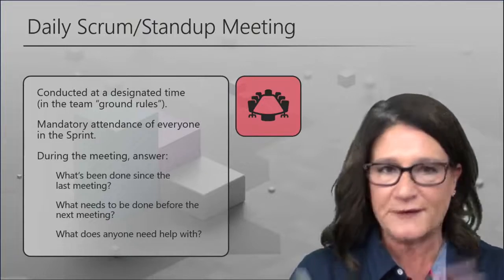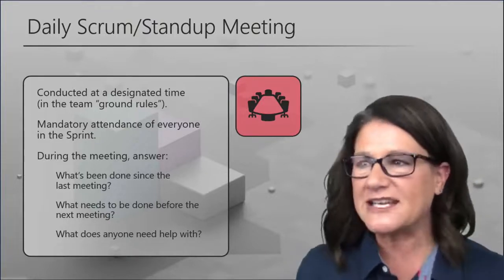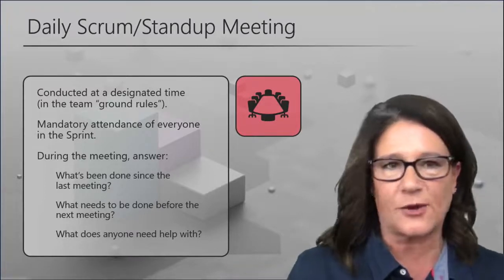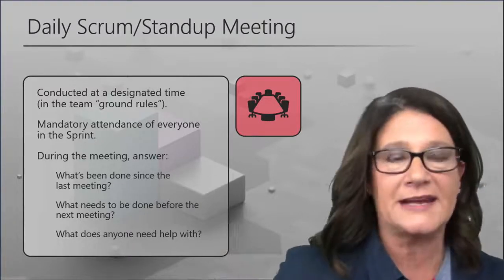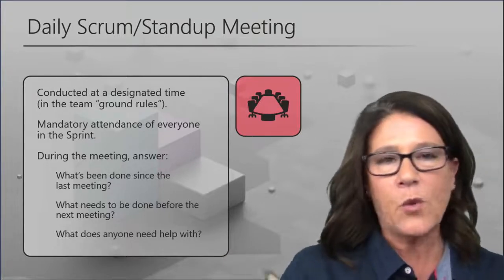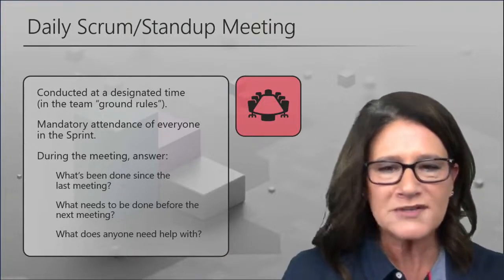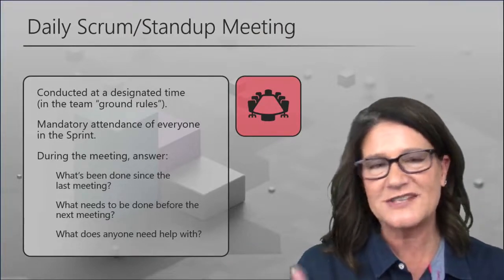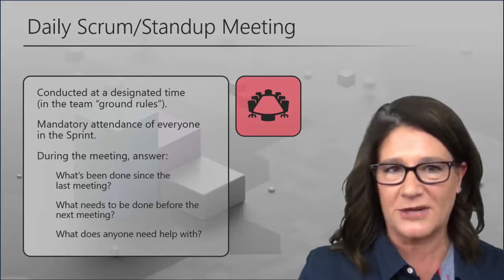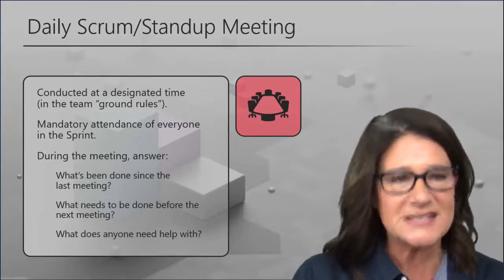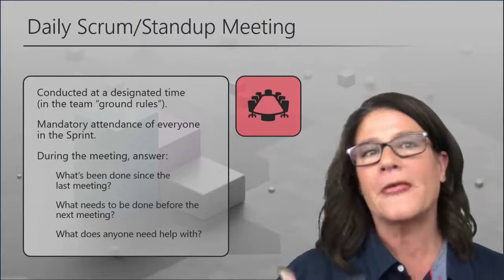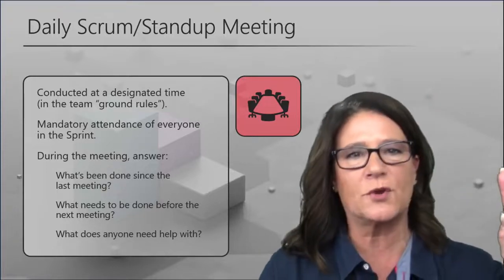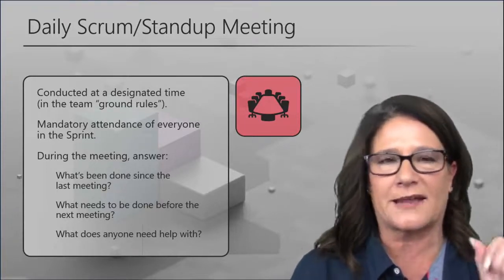If you've ever sat in a weekly meeting with circular conversations — just terrible with your team — what we're trying to do is eliminate the need for those weekly one or two-hour-long status meetings. Instead, every single day at the same time, same place, time-boxed for about 15 minutes, the team gets together and answers individually: What did I do yesterday to help the team meet the goal? What am I going to do today? And what impediments are in my way — what speed bumps am I coming up against?